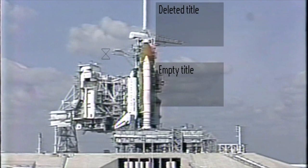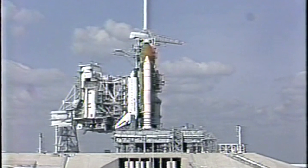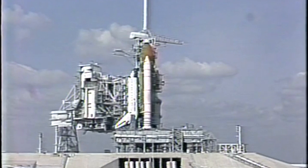After T-minus 20 minutes, all problems or trends that require a countdown clock hold will be reported to the NTD on channel 212 together with your recommendation. After T-minus 5 minutes, any hold, manual or GLS, must be accompanied by a description of the problem and your recommendation. The count clock will continue until T-minus 31 seconds unless your recommendation is to hold to the next milestone. And the milestones are listed on page 624. The plan that we have this morning will take us through engine startup and shutdown. We'll go through the RSL abort sequence, the post-abort safety checks.